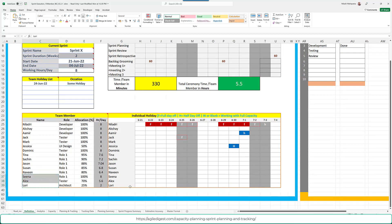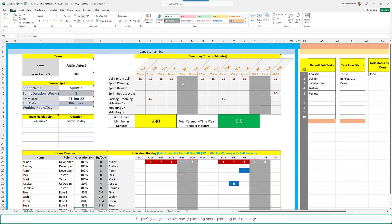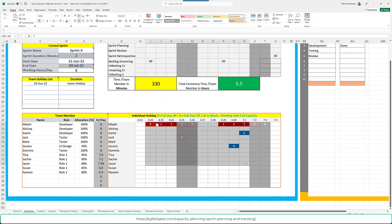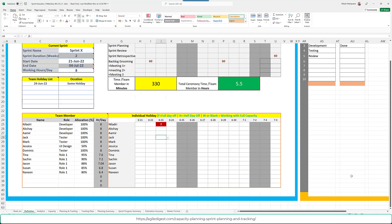You can identify how many team members you have. Leave gray cells blank — those contain formulas. The maximum limit is 15 members. You can also define the different sprint ceremonies and events that the team will spend time on. Here the total is coming up as five hours, captured in minutes. This area captures any individual holidays or planned days off to help with capacity planning.